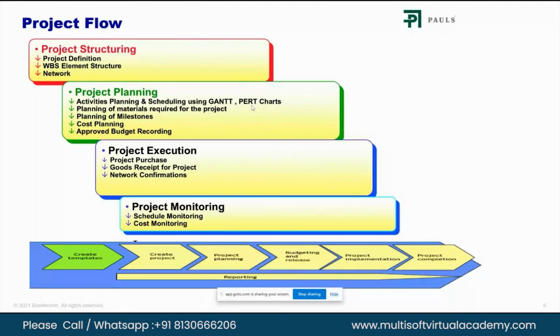Then proceeding with execution, I'll create one WBS, naming it as execution of the building. Then another one would be, say, construction of clubhouse, construction of gym. So I'll be dividing the entire project into several parts and I'll call it work breakdown structure. So it would be easy for me to track the project progress in parts rather than in one complete block.